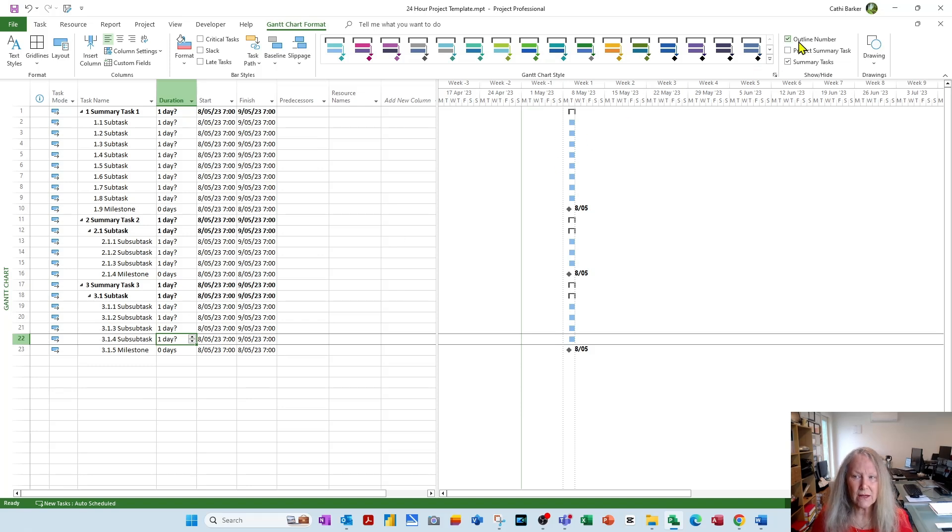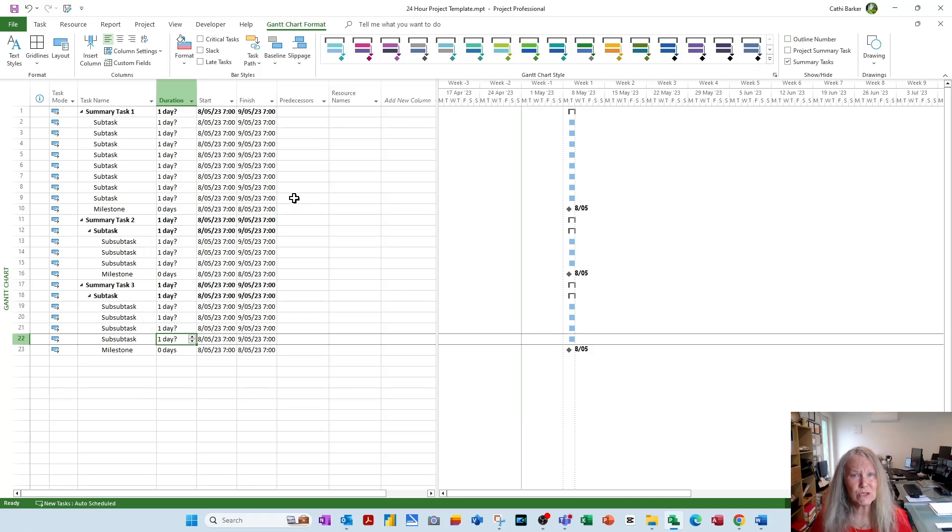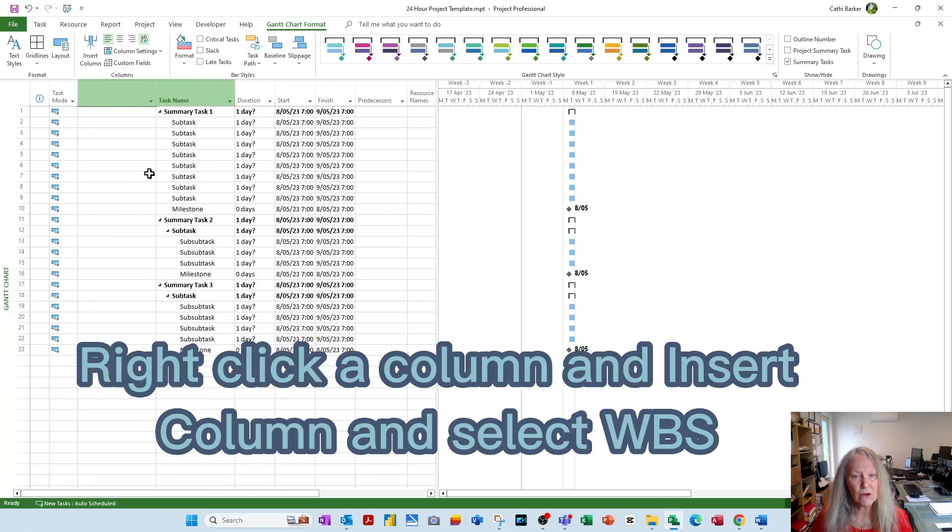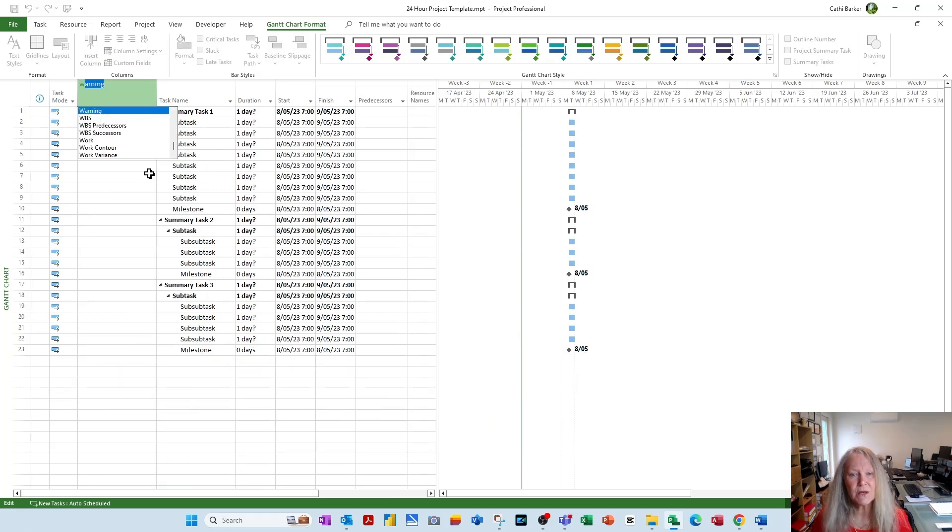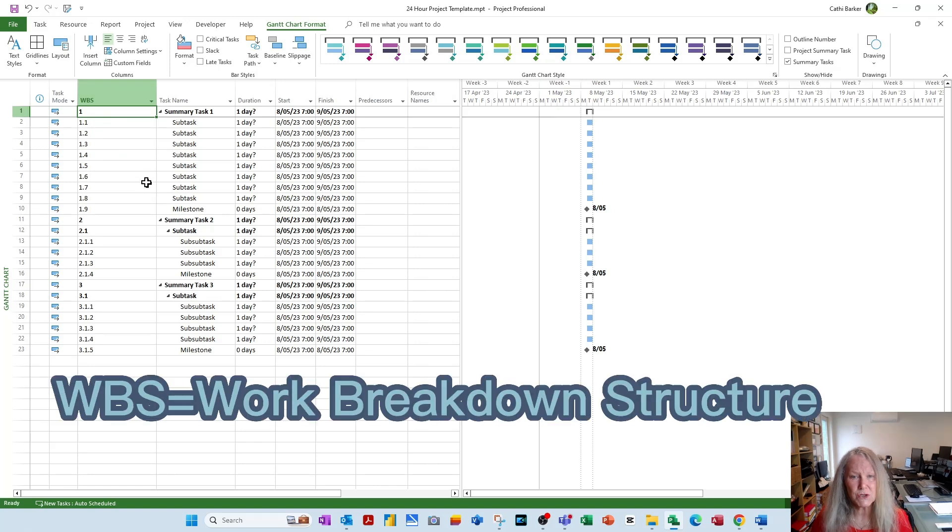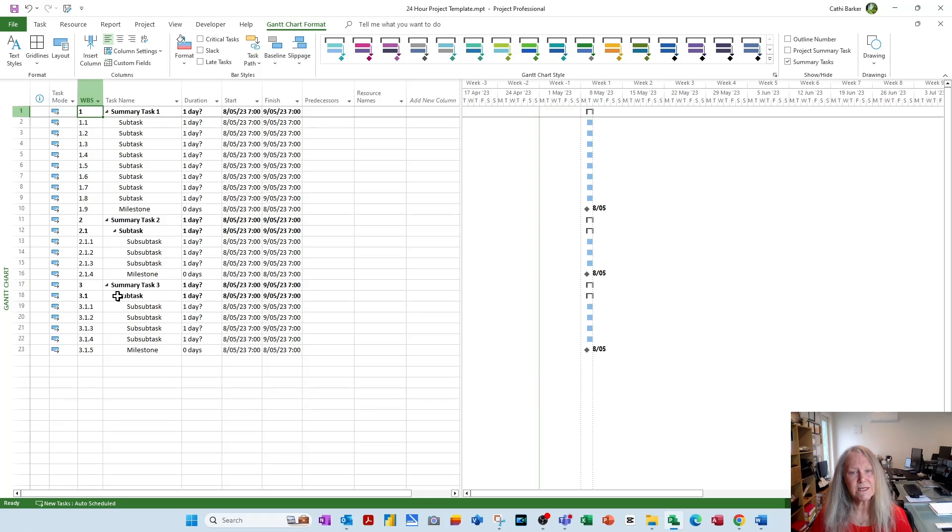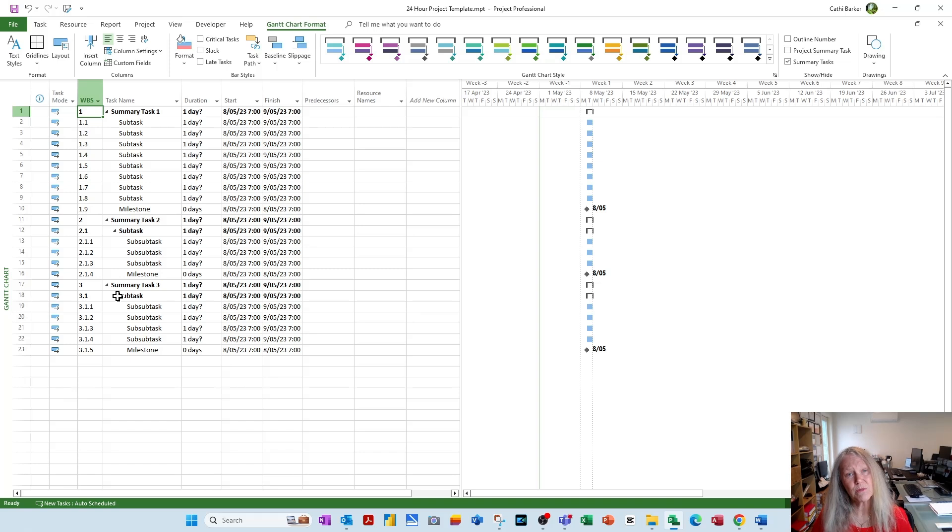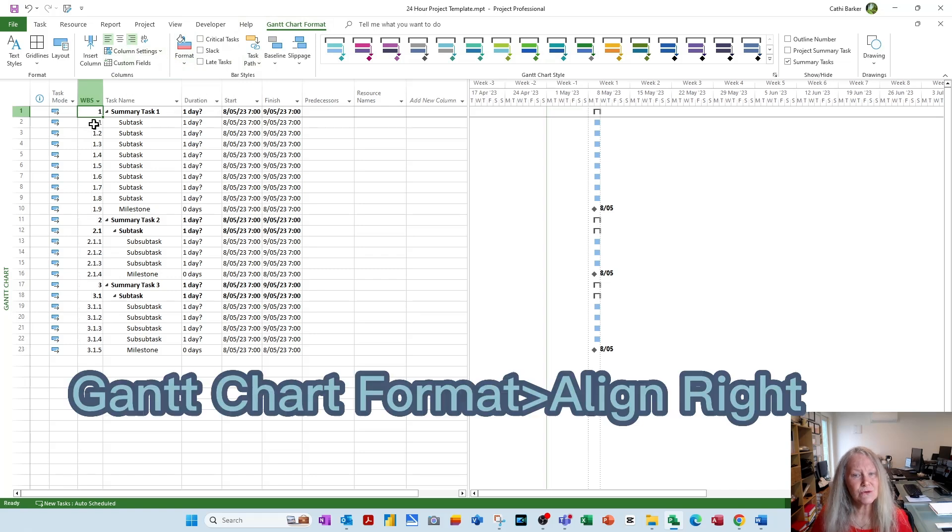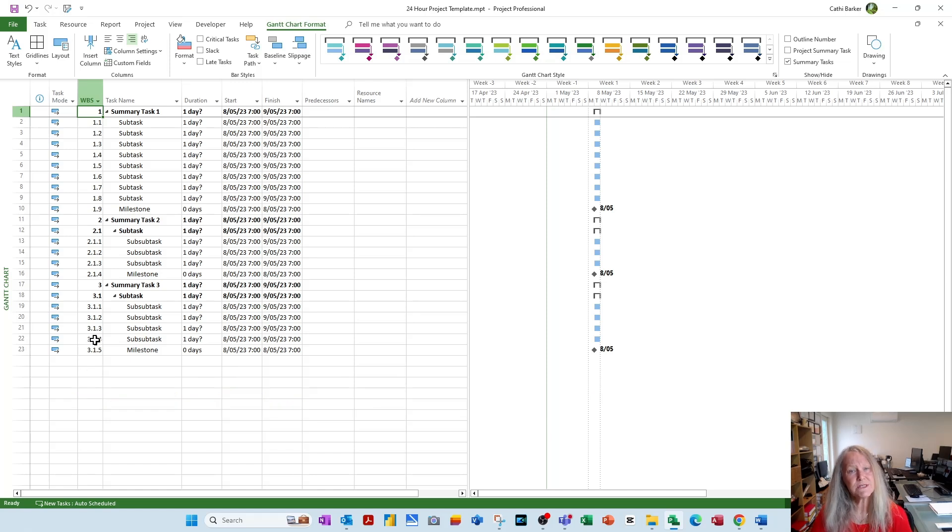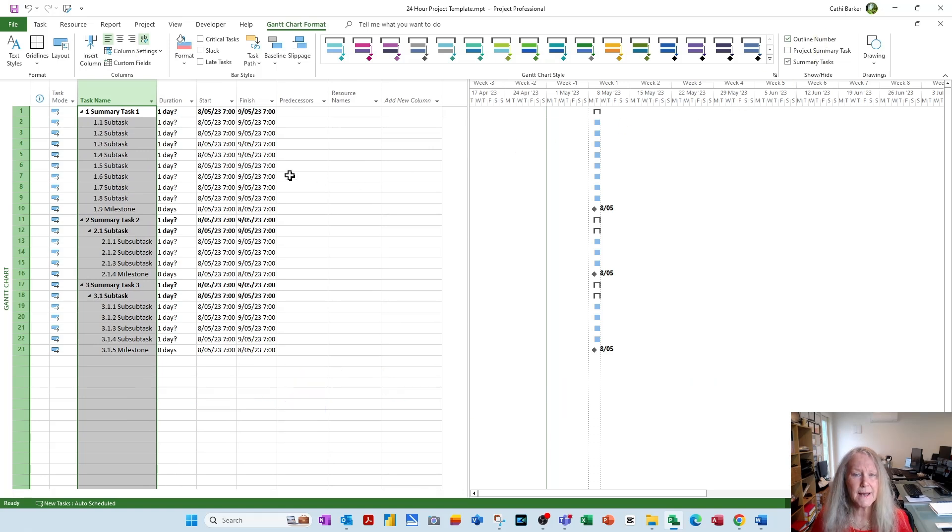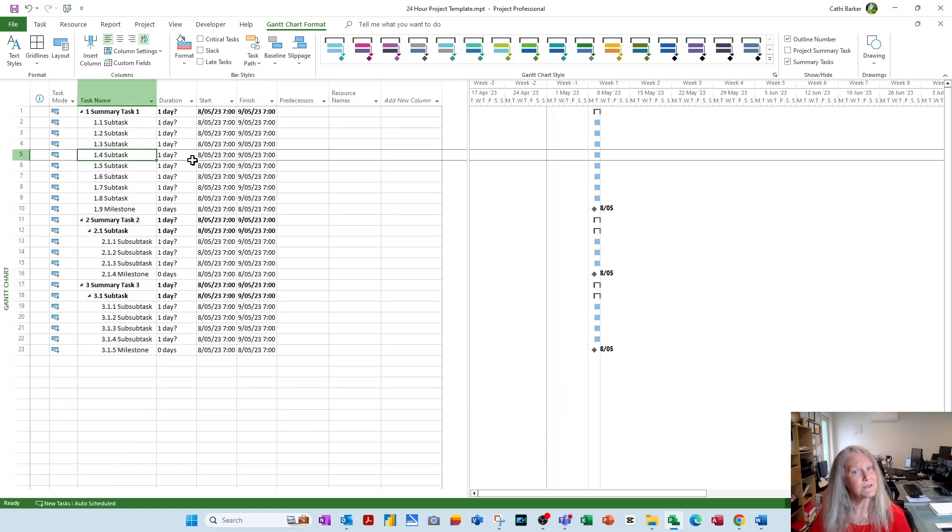But maybe I don't turn on outline number and instead I want to insert a column called WBS. Right click the task name column and insert column. Press W to jump down to WBS. WBS is a project management term which is short for work breakdown structure. And I'll just adjust the column width. And the work breakdown structure basically assigns a unique number to each task. And a lot of project managers like to work with the work breakdown structure. Now the other thing you can decide is because it is a number, it should be right aligned. So on the Gantt chart format tab in the ribbon, you have the option to align to the right. So decide. Do you want WBS or do you want outline numbering? I'm actually going to hide WBS, right click and hide that column. And actually prefer to tick the outline number and I'm going to work with that in this video.